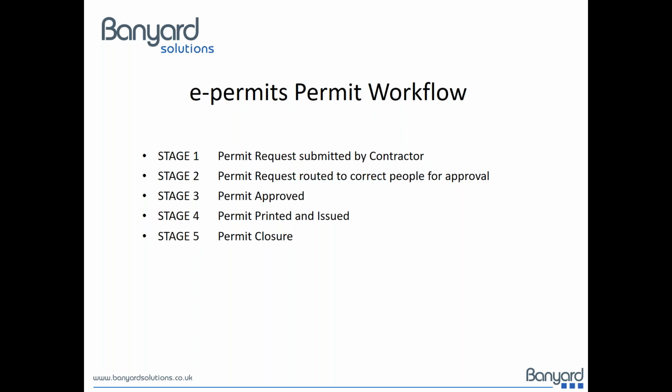So depending on what your process is and who is required to sign permits off, we would replicate that within the system's workflow. The third stage is permit approval. The fourth stage is permit print and issue, and the final stage is obviously permit closure.